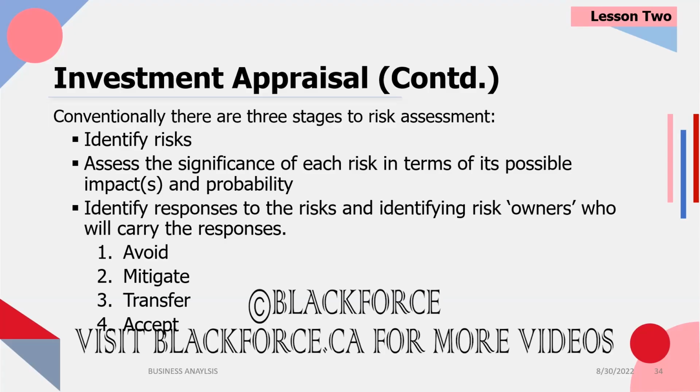When you're avoiding a risk, you're basically carrying out actions that would reduce the possibility of it happening. You want to reduce it to 0 as much as possible. That won't always be possible, but there will be a plan to try. An example would be to avoid a risk of selecting the wrong software package. Do a proof of concept.